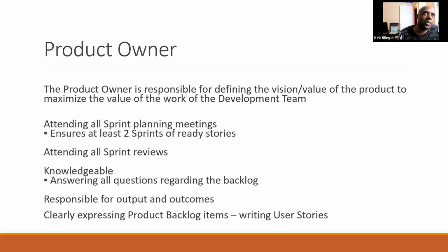And I just want to mention one thing. I may prioritize the feature, but my prioritization isn't final, because it's the developers that have to do the work. Sometimes they'll look at all the requirements and let me know, okay, we may have a problem with getting this one done. Can we maybe change the priority for a particular user story or feature? Then I'll go back to the stakeholders and explain to them what's going on, and I get the sign off. Then I negotiate with my developers, and we can adjust the prioritization of any particular feature.